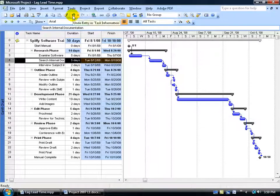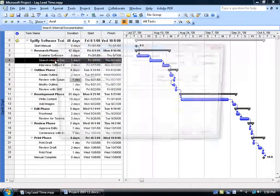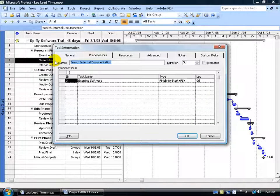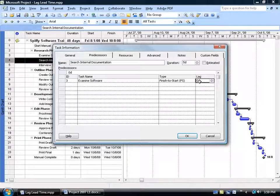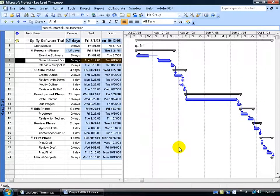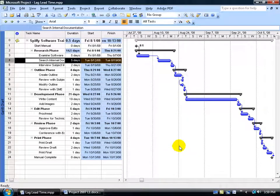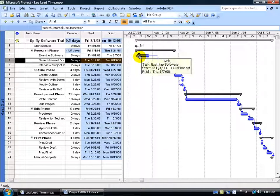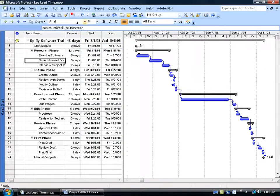I'm going to hit undo and then double-click on the same task here. For the lag time instead of using hours, minutes or weeks, I'm going to type in 50%. I'm going to use a percentage and hit enter and then click OK. What the percentage means is that it's going to take the total time of the previous task which is 5 days, and it's going to take 50% of that as its lag time, or 30% or whatever percentage we type in there.